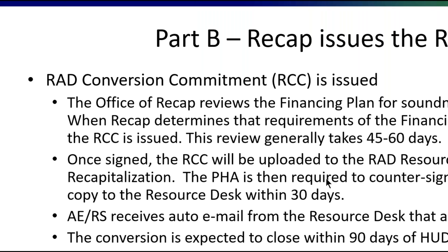The executive receives an email, and the resolution specialist receives an email from the RAD resource desk saying the RCC has been issued, so that you don't have to check constantly to see the status, but instead get a little email tickler letting you know that things are progressing. So once that RCC is issued, it's 60 to 90 days or so to closing.